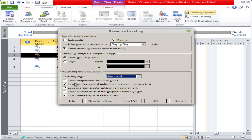Another option is 'Level only within available slack.' We will discuss slack in another video, but basically this option tells the software to adjust dates without changing the end date of the project. Based on that constraint, the software will change dates so that over-allocation issues can be resolved.